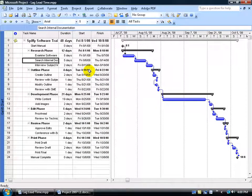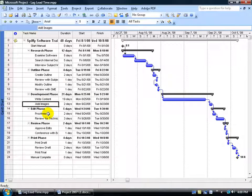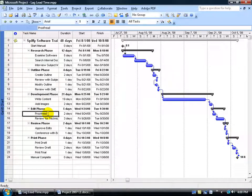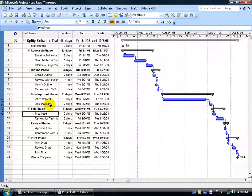I'm going to hit undo. Now what about lead time? I'm looking down here at task 13. Once that's complete we're out of the development phase and we're moving right into the edit phase, which the first task is going to be proofread. So let's say that I want to have some lead time. In other words I want to start proofreading a little bit earlier. I don't want to have to wait for the images to be added. Because basically the content's been written, all I have to do is proofread the content, not necessarily the images. Have a little bit of lead time here, start a little bit earlier and not wait for the predecessor to finish or complete.